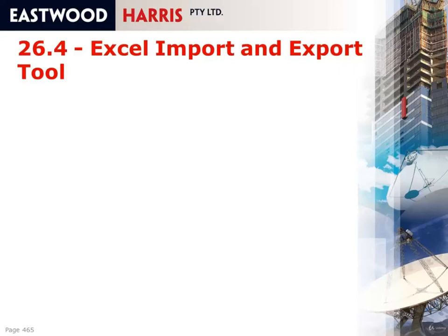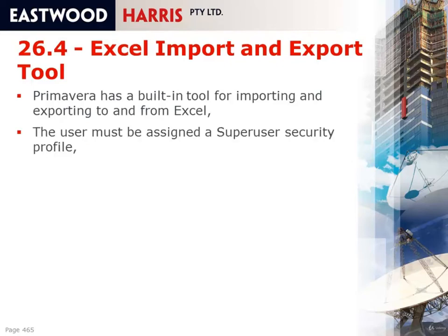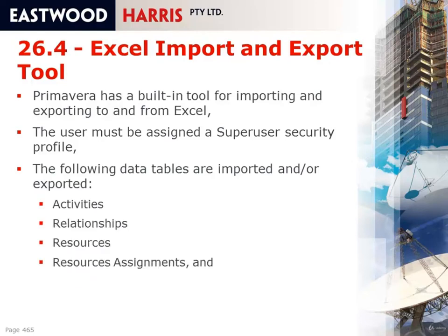Excel Import and Export Tool. Primavera has a built-in tool for importing and exporting to and from Excel. The user must be assigned a super user security profile, and the following data tables are imported and/or exported. There is an activities table, a relationships table, a resources table, an assignments table, and an expense table.